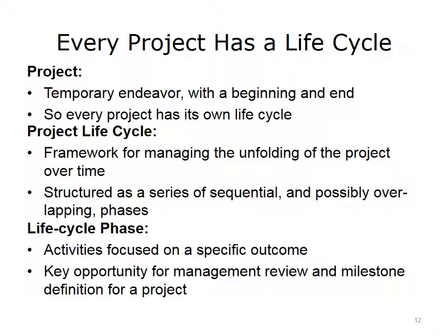The framework can be structured as a series of phases, and these phases can be sequential and often overlapping as well. So a key element of a life cycle is a life cycle phase, and a phase is a set of activities that are focused on a specific outcome. Thinking in terms of phases provides opportunities to introduce a management review into your process, as well as to consider them as milestones to define the project and deliverables during the project.